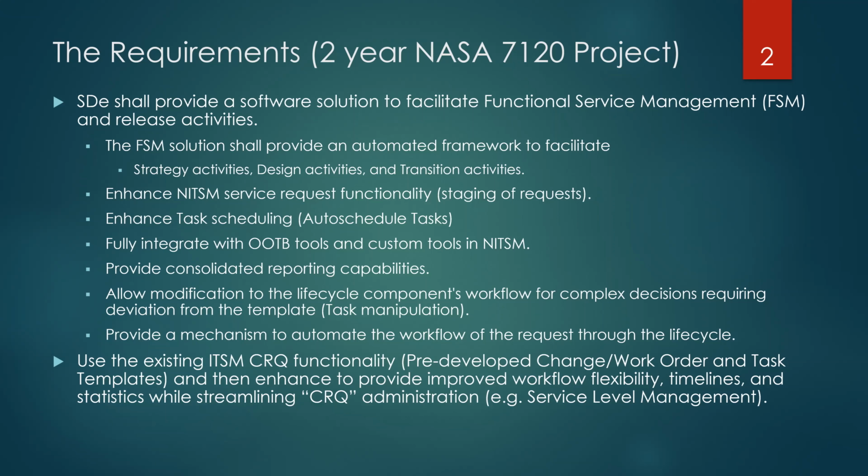This is a list of some of the requirements. And I mean, just some. This is just a smidgen of the requirements that we had for this project. We actually had a spreadsheet containing all of the level 1 requirements, broken down to level 2, broken down to level 3. We went all the way down to level 5 on some of our requirements to get detailed. There were probably in the neighborhood of about 600 lines of requirements in an Excel spreadsheet, broken out that way.